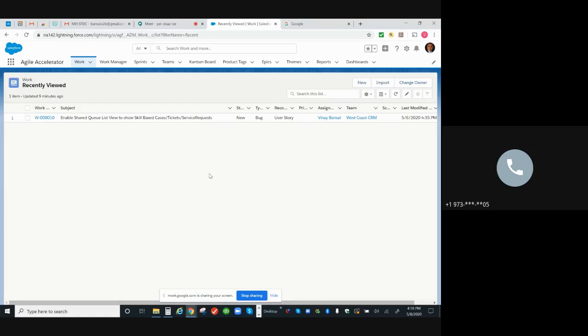If something can be done in 30 minutes, then I say it's one story point. Then 1 hour is two story points, 2 hours is four story points, and so on. Like I said, eight story points is the maximum we think we should go for, which is 4 hours. But you can go up to 3 days, if somebody wants to, looking at the size of the work. Once we define that story point, we log that, and then we work accordingly.